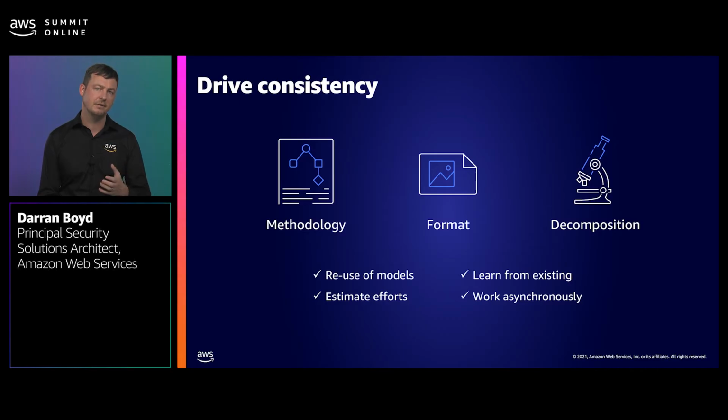On the topic of effort, driving for consistency allows you to estimate your efforts more accurately. Estimating efforts is crucial to ensure that we allow for sufficient time within our delivery timeframes to perform the threat modeling exercise. Accurate effort estimation reduces the likelihood of causing a delay to the delivery of the business outcome. When you are consistent, you can use the historical data of how long threat modeling has taken in the past to inform estimations for the future.